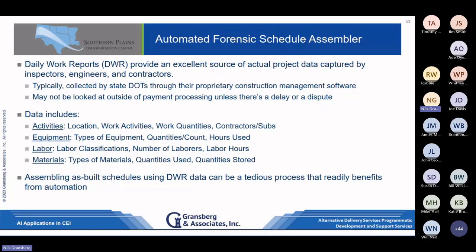So, your DOTs usually have some kind of digitized daily work report requirement. And I don't know any DOTs that don't. There may be some out there. But being able to have those generated and stored in a single repository or in the cloud means they're accessible, and we can look at them. We may not look at them unless we're doing payment processing, or we get to a dispute. When we're putting together an as-built schedule for a delay claim or something like that on a project, it's got great data to do that with.